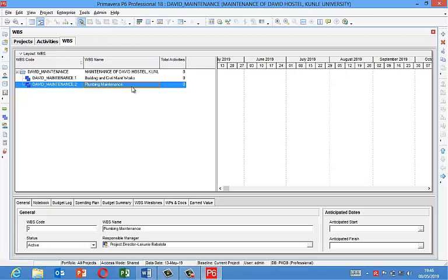I use my left arrow key. Press enter. I'll give it 2. It's already giving me my WBS ID. The first one is 1, the second one is 2, because I shift left to align the 2. So I now have 1, 2, WBS element 1, WBS element 2.